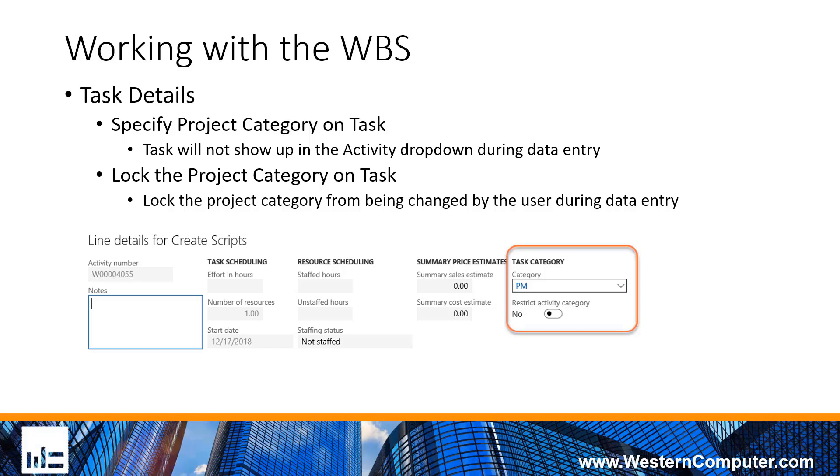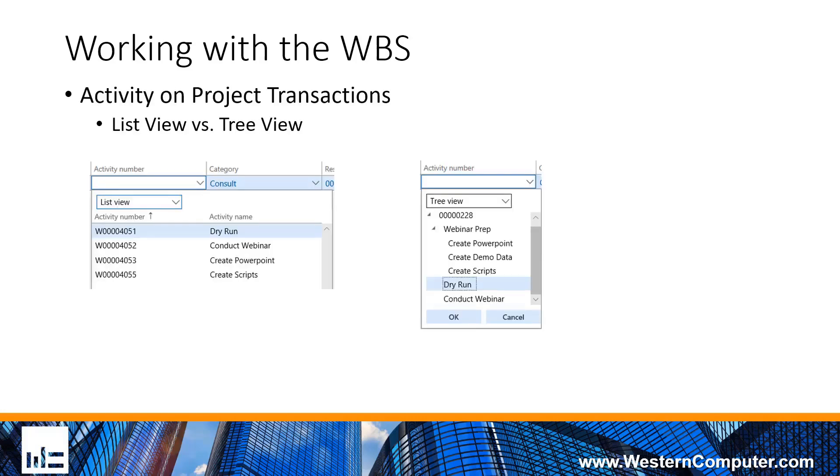What they also allow you to do is lock that project category from being changed by the user. If you have a strict setup with regards to project categories, and this task really should go to no other category than the one that you specified, you can lock that project category so that the users can't change that and change pricing, for instance. You can have pricing set up with regards to project categories, and locking that category will lock that pricing into place, any of the cost or sales price into place.